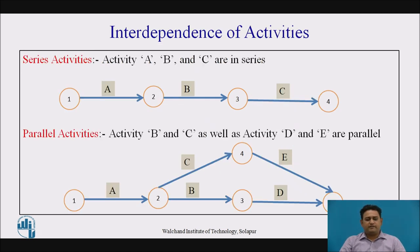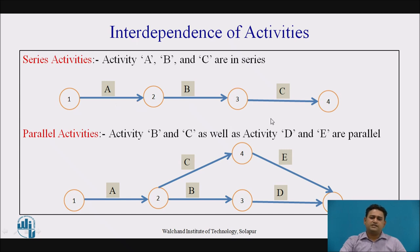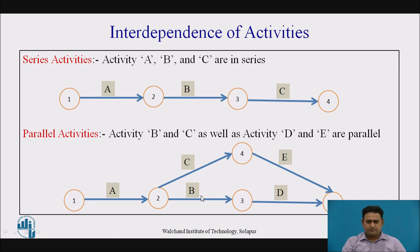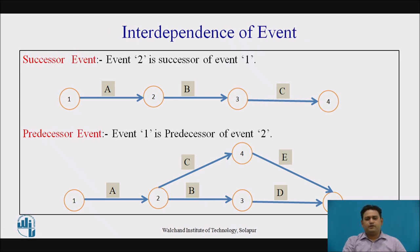Now the interdependency of activities. There are series activities and parallel activities. Here in this network diagram, A, B, and C are series activities. This means B is going to start only after the completion of activity A, and C is going to start only after the completion of activity B — these are in series. Parallel activities are activities which start simultaneously or are parallel to each other. In this network, C and B are parallel activities because they start at the same time, and D and E also run simultaneously.